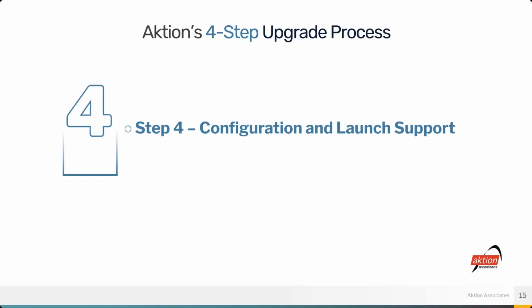We have a go live simulation step that we put into place so that once all that testing is completed, we're going through it one more time before go live, so that we're really going to roll out this process, and we've tested the whole system from beginning to end. You're comfortable with how the application is performing, what the steps are.